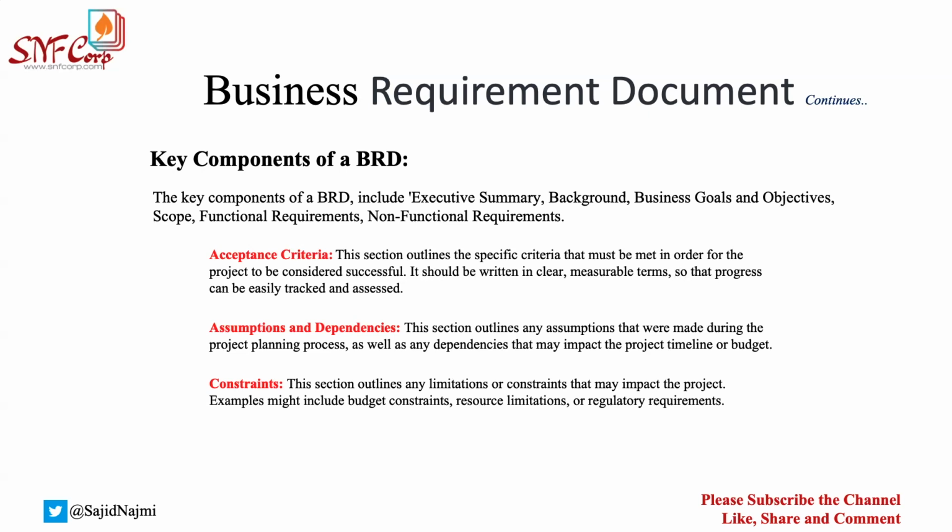So, just to summarize, acceptance criteria may directly cover all the functional requirements, but business may have written things differently. So that should be very clearly written under the acceptance criteria section. Otherwise, the project will be in trouble when you are trying to deliver and doing a demo. Business may ask you so many things that you will not have proof for. So it is very important for you to write the acceptance criteria agreed and approved by the business and by the team. Acceptance criteria should always be reviewed by the team as well.